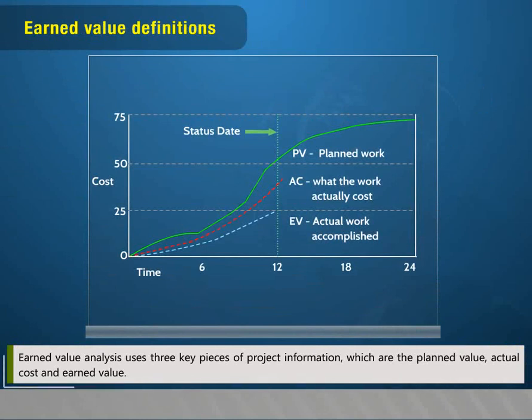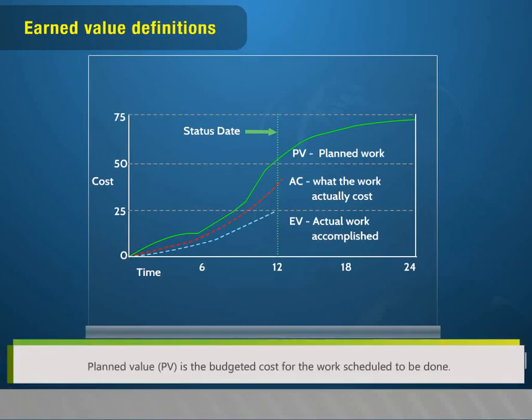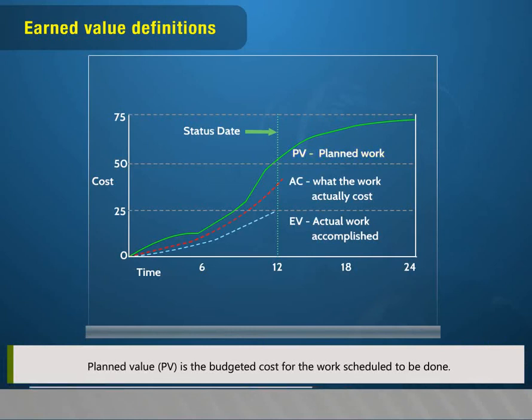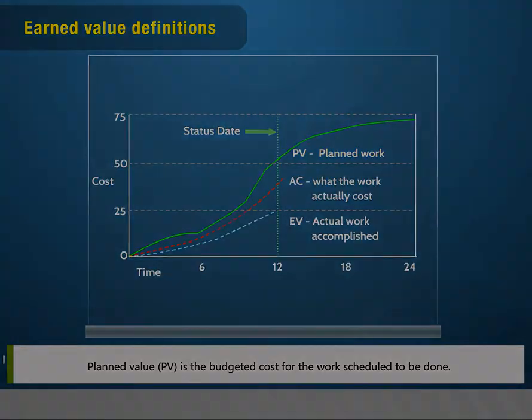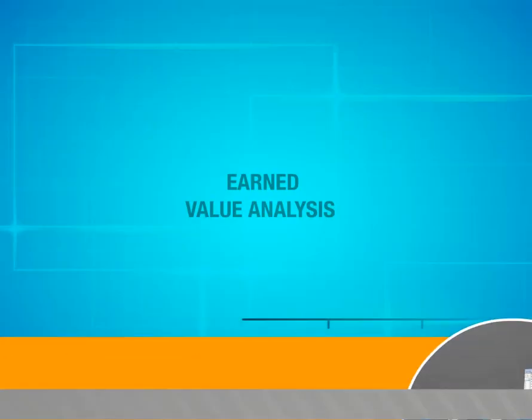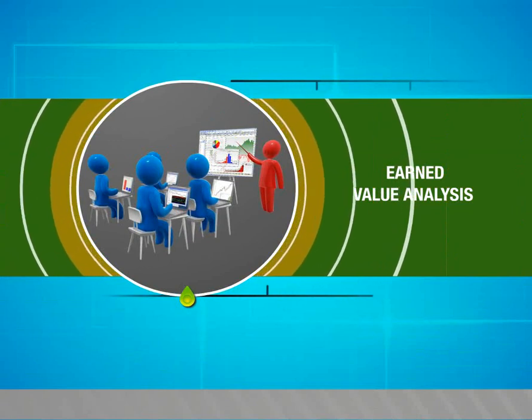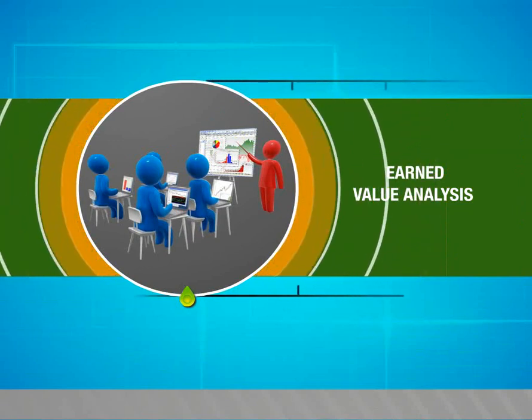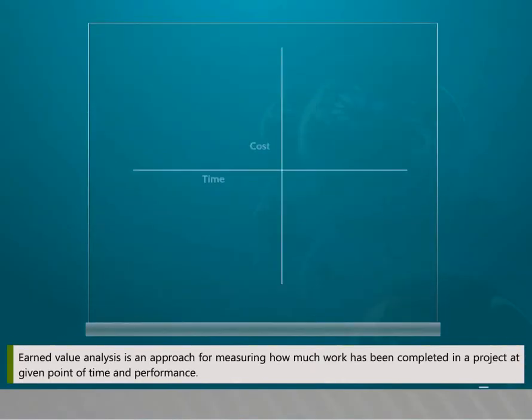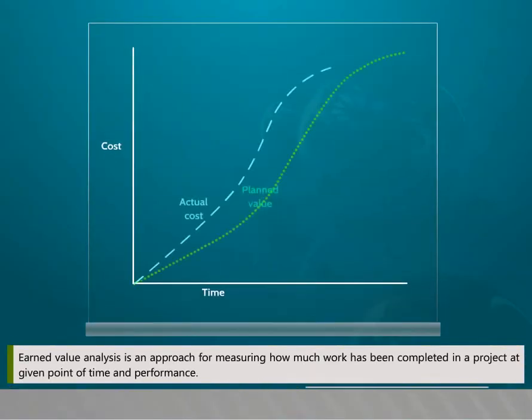Since the types of work packages on a project vary, no single progress reporting method is suitable. The 7 most common methods for reporting project progress will now be described. Quantitative progressing techniques are units completed: tasks that involve repeated production of easily measured pieces of work when each piece requires approximately the same level of effort.